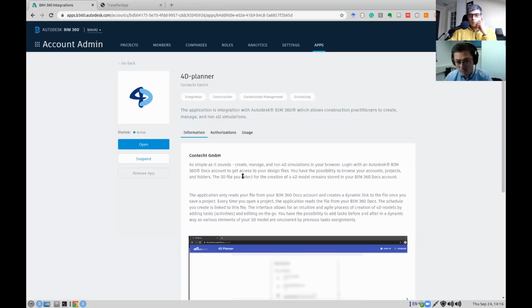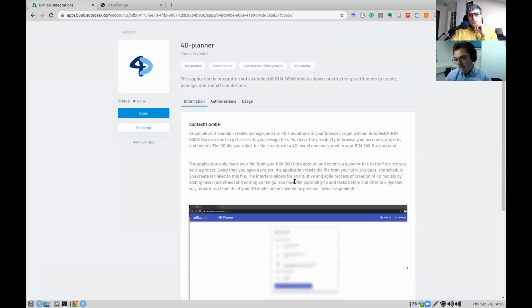On big projects, for example, let's say we have two disciplines like structure and MEP, right? So each discipline will develop their own models and their own schedules for the execution. And then when you bring them together, you try to identify those parts of the project where, let's say, MEP is placed before the structure, which is not possible, for example.